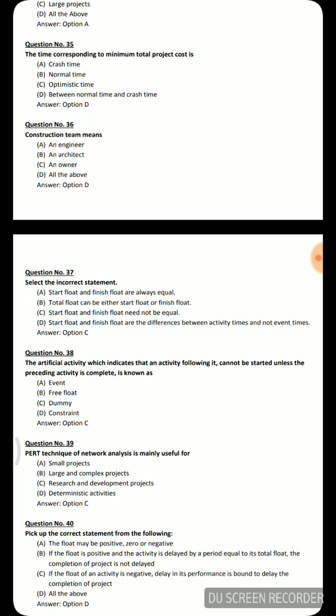Next question: PERT technique of network analysis is mainly useful for — small projects, large and complex projects, research and development projects, or deterministic activities. The correct answer is option C: research and development projects, because PERT is a probabilistic method, not deterministic, and it is used for projects with high time uncertainty, such as research and development.